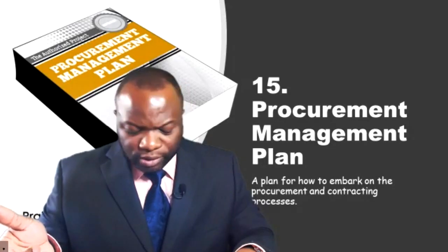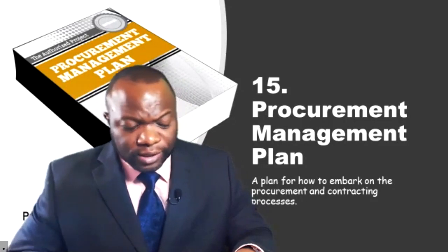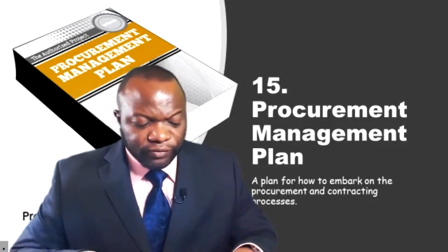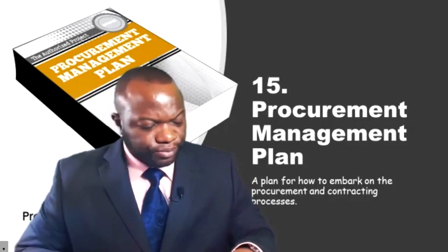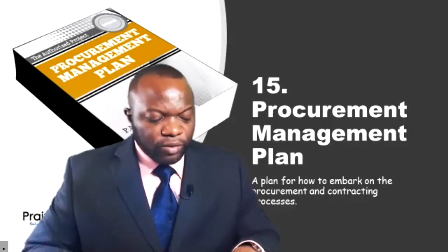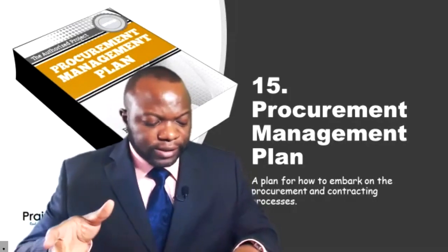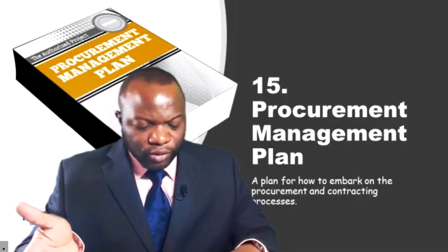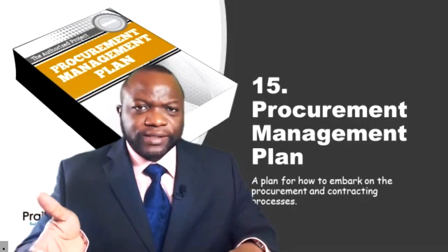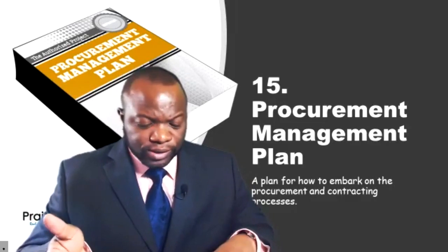Well, let's go a little bit further here on 475. It says, if the project is financed externally, the sources and availability of funding should be aligned with the procurement management plan and the project schedule. It then says a procurement management plan can include guidance for how the procurement will be coordinated, timetable of key procurement activities, procurement metrics used to manage the contract, stakeholder roles and responsibilities, constraints and assumptions that could affect the